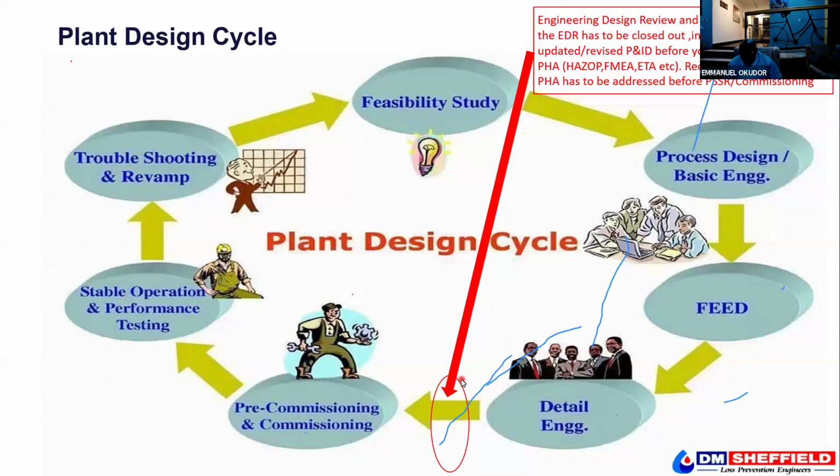Your PHA must be done after you have done the engineering design review. Okay, so the same thing here.